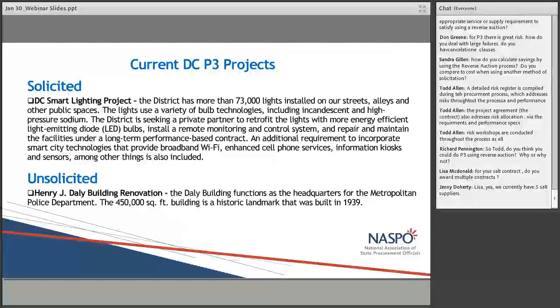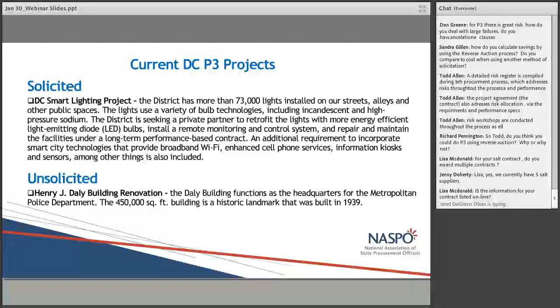I'll let Jenny go first since she answers both the questions. We look at best value approaches in many of our RFPs, where it's not essentially apples to apples because you have slightly different proposals and responses. You dictate what you can dictate, but then you also ask them to propose and describe certain things. That's the technical piece that is evaluated and scored on its own, outside of cost. And then you have the cost for that program.